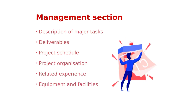The management section is the second part of the proposal. It includes a description of all the major tasks, the deliverables, your project schedule, your project organization — who does what by when — related actions, and the equipment and facilities you will need. This is the heart of what the project is all about. It details who is doing what, by when, and most importantly how.